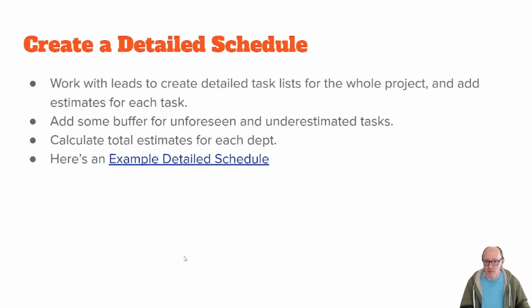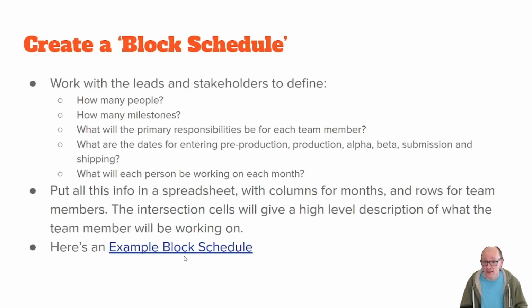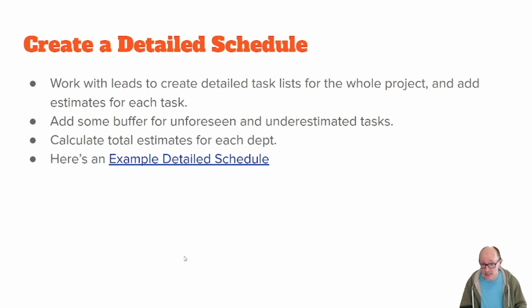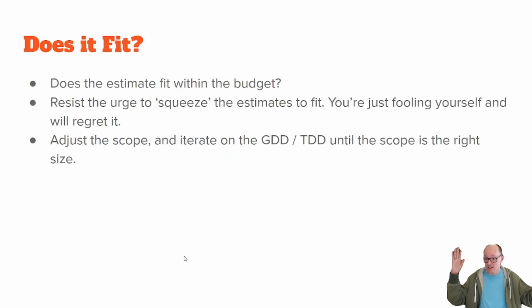All right, let me bring it back here. So we've got our block schedule, we've got our detailed schedule. Does it fit? So does the estimate fit within the budget? In this case, no, it didn't. And quite often it won't. So what do you do about it? First of all, resist the urge to squeeze the estimates to fit. You're just fooling yourself and you will regret it.